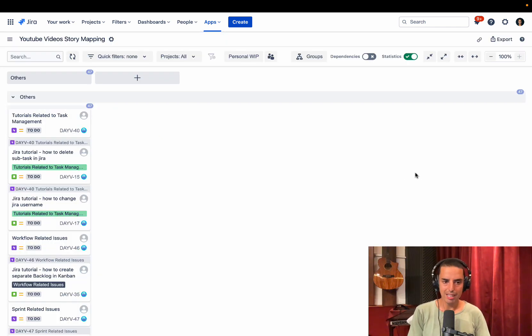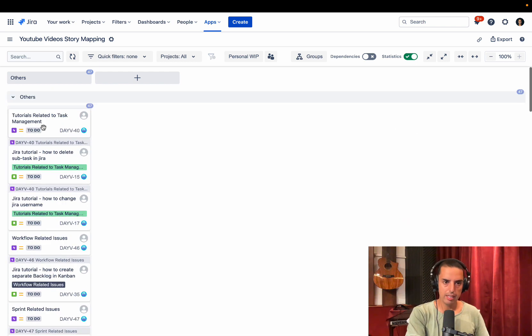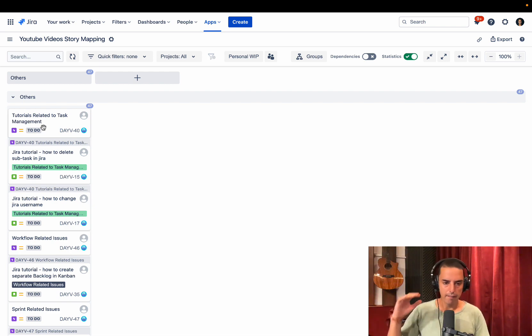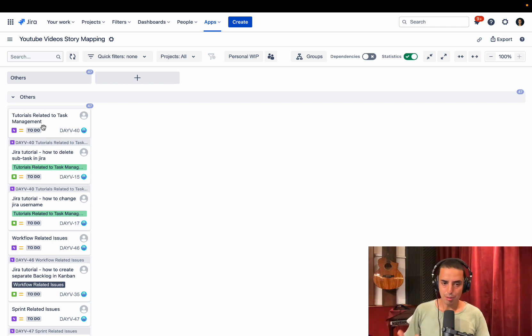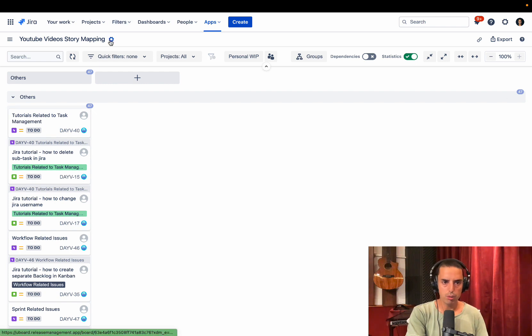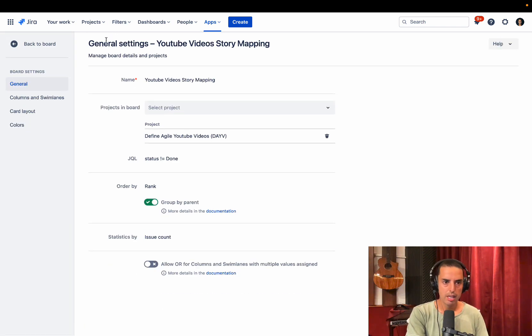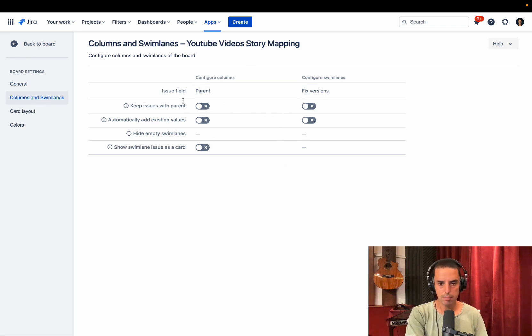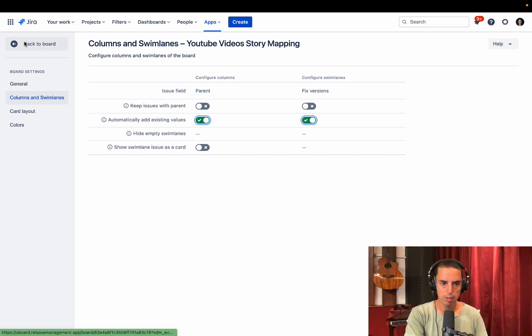Once I am here, I'll see a bunch of things, but I want to make sure that it automatically pre-creates me versions and epics. So I'm clear what we need to do here. And they allow you to do just that. So if you see this screen, what you have to do is you have to go to the wheel, click on settings. You can click on columns and swim lanes. And here you can see what are your swim lanes by parent. In our case, parent is epics and by fixed version. And you can say automatically add existing values in here.